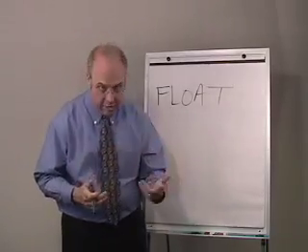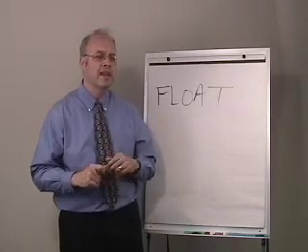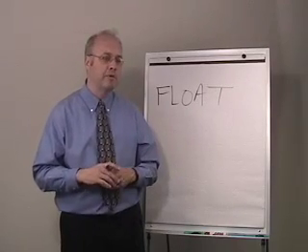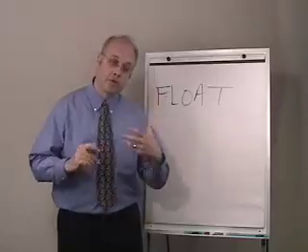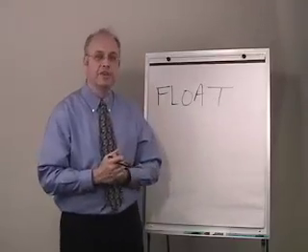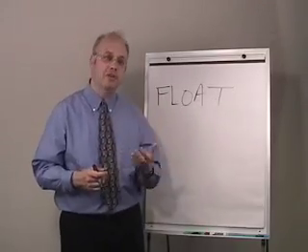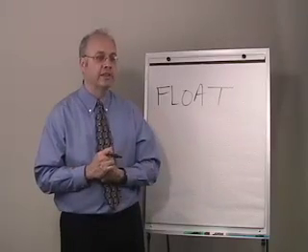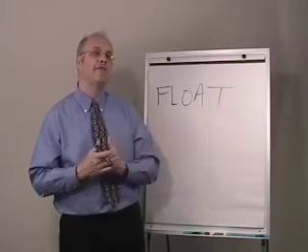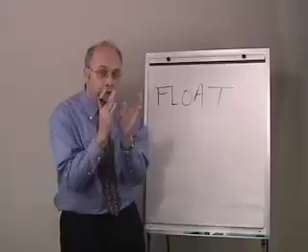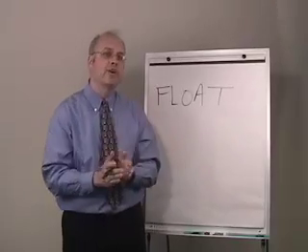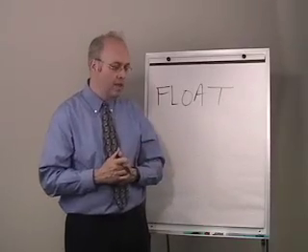It's not available to them on a first-come, first-served basis. That's a very common subcontractor provision. Subcontractors who are bidding work should be aware of that provision. And if it's something they should negotiate, that would be a provision they need to have eliminated, or at least they need to have the conversation with the general contractor to find out really where the float is for their work or is not.